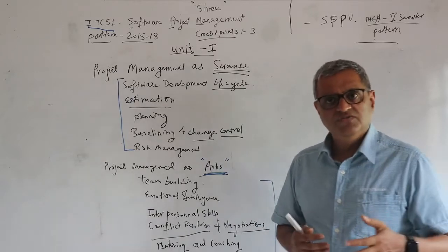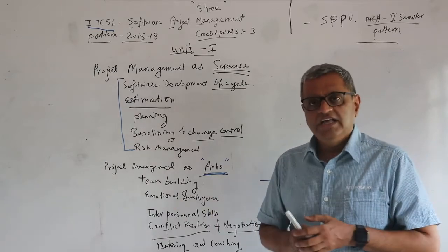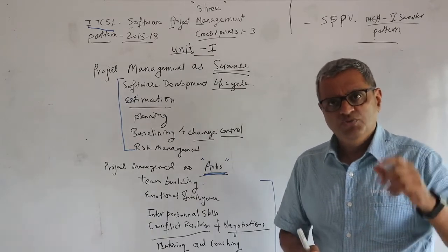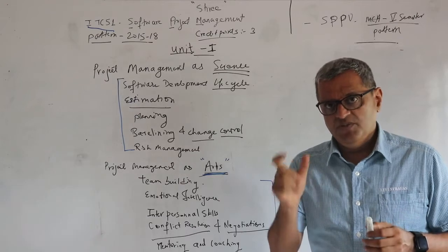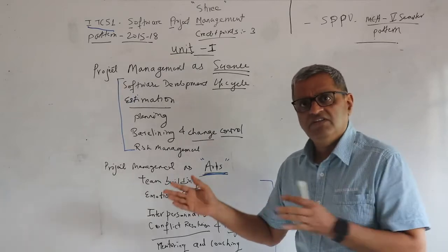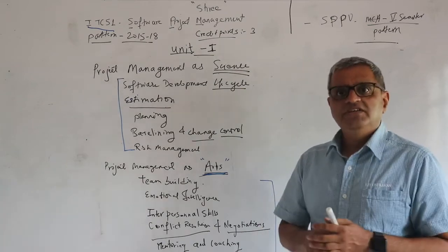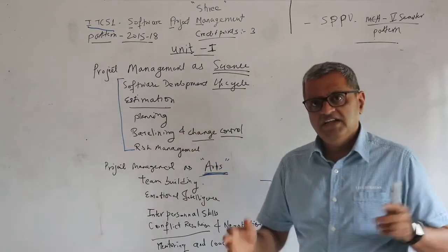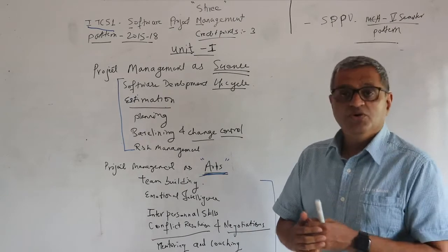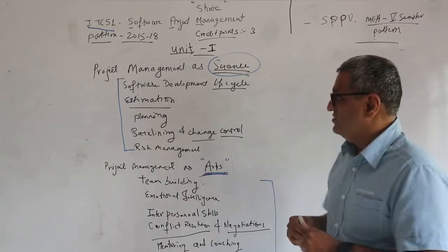You can size it based on function point analysis, you can size it based on the COCOMO method, or Delphi. So there are different kinds of methodologies based on which you can size a software and estimate how much effort is required. Once you estimate the effort, you can break it down into design, development, and test, and ensure that you make resources available to progress the life cycle. So estimation again becomes a process, a methodology which needs to be followed in order to size the software, and it's very much a part of the scientific wing.